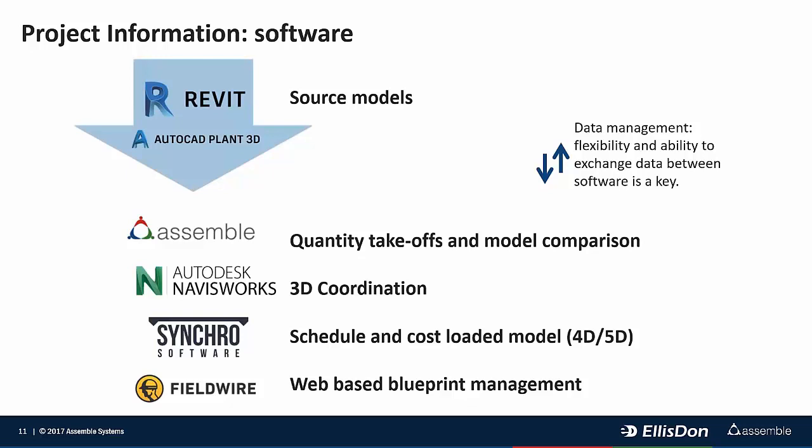And at the same time, thanks to Assemble, we actually have 2 versions of the project up. We received several Revit models as progress models as design was evolving and changing. We had certain freeze dates for the estimation team because they can't make an estimate for something that's changing. They need some freeze dates. We need to set the goal so that they can get to it, as opposed to constantly resetting the goalpost. Right. So one project is specifically for the estimators to make sure they're using the correct information as those benchmarks.